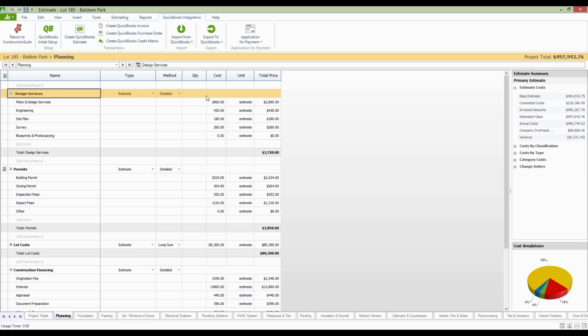And this has a cost associated with it. It's going to be the cost to me, and a price associated with it, which is typically the price to my client. As you get to the end of this, there's also going to be a company overhead margin, which will typically show an overhead, a profit margin, contingencies, and some of my clients will use things like insurance might show up on that last page, or sales tax or something like that as well. This you can all put onto the company overhead margin sheet because it calculates as a global percentage of the entire project.